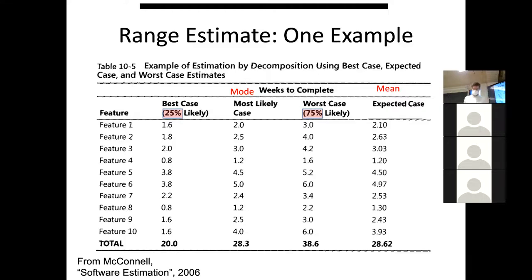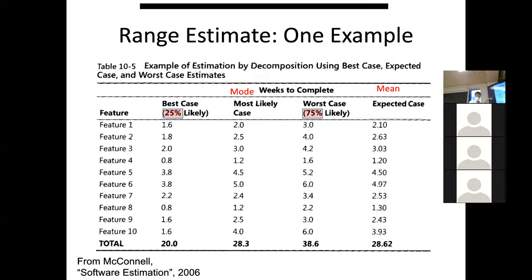What we'll talk about next time is some subtleties. First, a key vulnerability: these ranges tend to be too narrow, not too wide. Historically, people are not only optimistic — they are also overly confident about how well they know. They're too sure that the truth falls within their range. This is exactly the same problem that showed up in our quiz exercise: the same tendency toward overly narrow estimates.